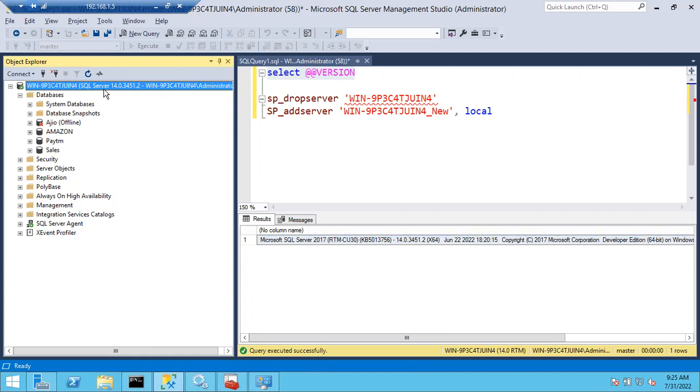So what he is going to do, he will log into this server and check what's happening, why it was down. He is trying to start the SQL Server. So it's very important that you send an email to the DBA team also, before patching. You have to include the DBA team also, so that the other team members know that someone is patching the SQL Server, and this SQL Server won't be available for the next 2-3 hours, and they can expect some errors and alerts on that server. So until the patching process is completed, they don't touch the errors.